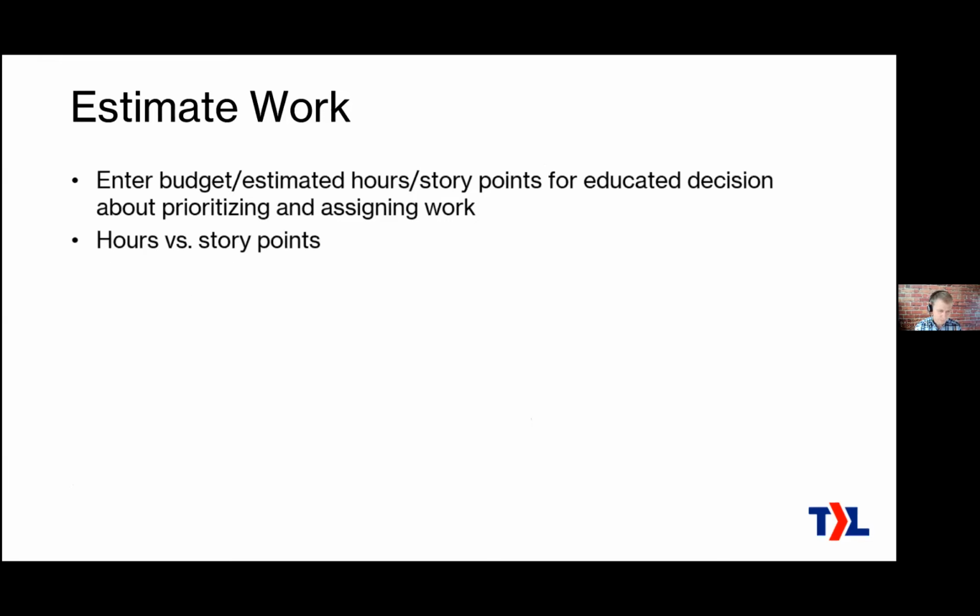So you may have heard of story points. Some people also call them complexity points. They have to do with the Scrum methodology, and a few other methods use that, but mainly Scrum. Instead of looking at just the hours you expect this to take somebody, it looks at the nature of the work to say how complex this is compared to other work. Is it twice as complex as some other ticket? Is it 10 times as complex? And so these complexity points are not comparable between different companies or even different teams in the same company.